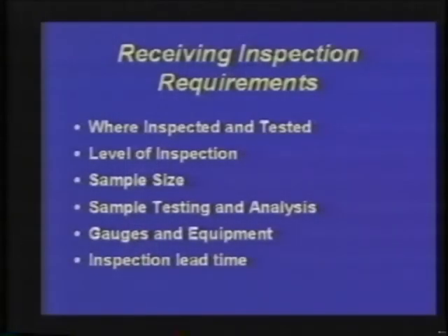We have to consider the lead time for the inspection process, and again, we identified that when we talked about the aggregate lead time of a purchased item. And then there is consideration for supplier documentation. Where should that supplier documentation be housed? I may want to put that documentation into aperture cards.